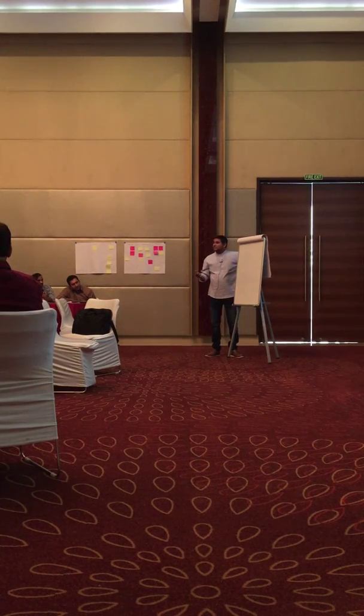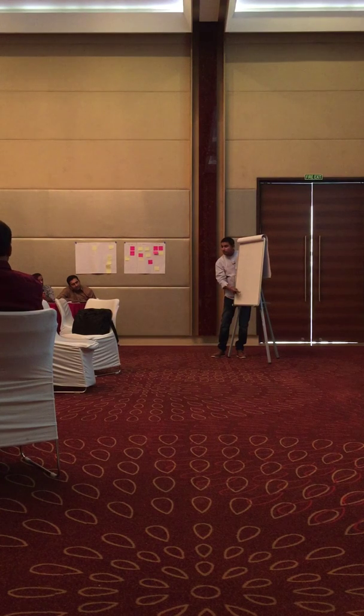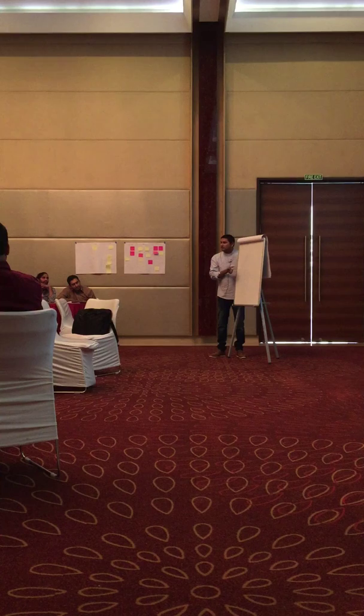So the advantage is, if you do it like this, you still have 7 days to fix anything that is missing in this story. Isn't it? Stop starting, start finishing. If something is pending with this, moving on to the next story does not make any sense. So stop starting new things, start finishing the existing pending things. So like that you complete this.